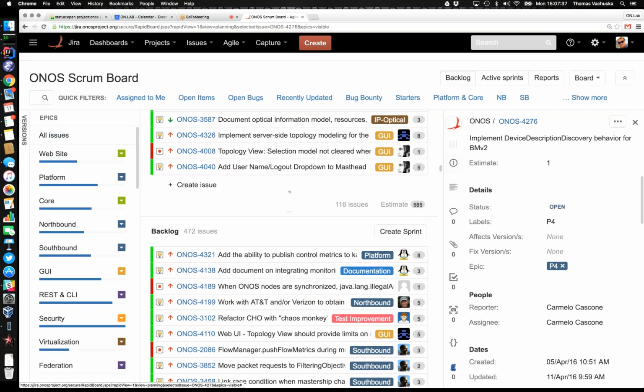Well, we had a 5 limit for a 2-week sprint, right? And we decided 8 was fine for the 3-week sprint. Oh, is this a 2 or 3-week duration? 3-week iteration, yes. So should we remove them? So I'm not sure when would be a good time.